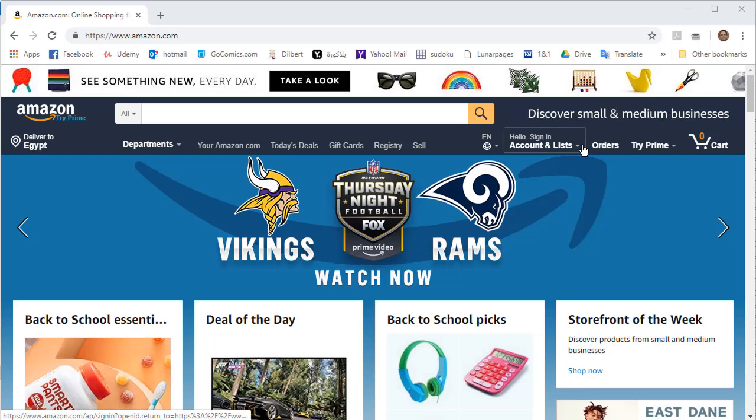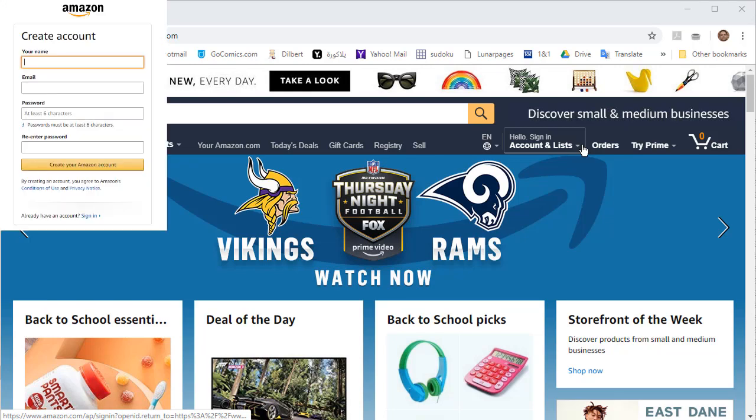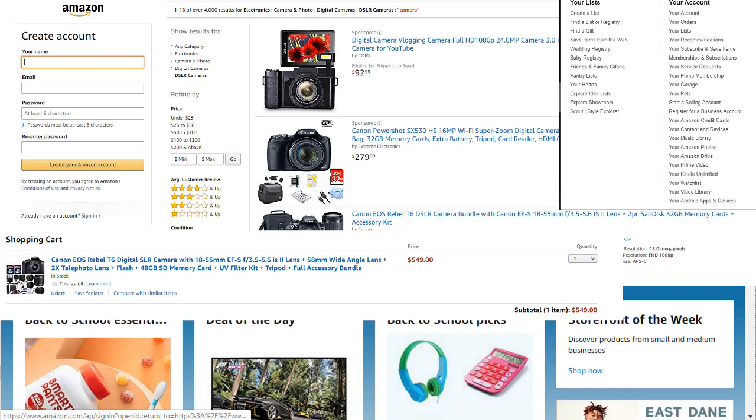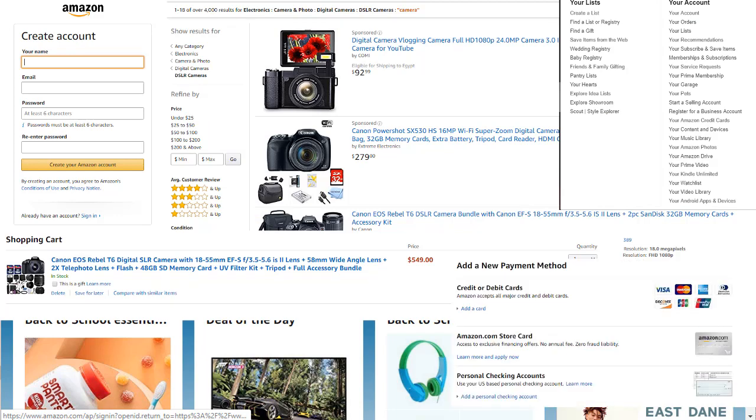Let's have an example here. If we are going to develop an e-commerce system, we have the registration module, the search module, then the cart module, and then the payment module, and recommendations, filters, offers, and the rest of the features. We need to break down this complex project into vertical slices to make our team able to convert each slice to a working increment in each sprint.